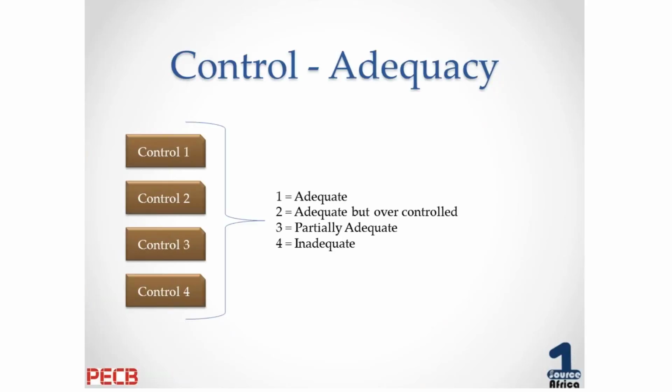And the reason for this is we really create controls to manage the causes, or the contributing factors, as they are also called, because if we can manage the causes of the risk, inherently we will manage the risk. So normally it's built up in a set of multiple controls onto a risk.